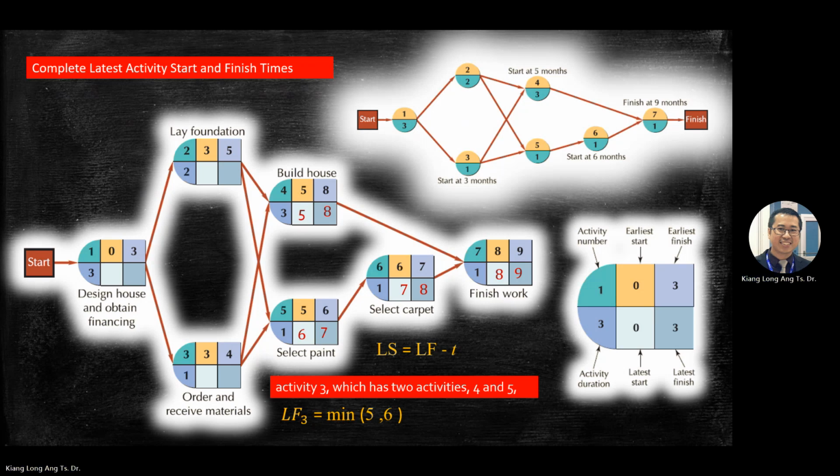That is the difference between forward and backward. So you can see the answer from here. You see number 5 is here. Because this one and this one also choose from here. So these are 2 options for activity number 2 and number 3. Because you're doing backward, you choose the minimum number. So you choose 5. That's why 5 is there.